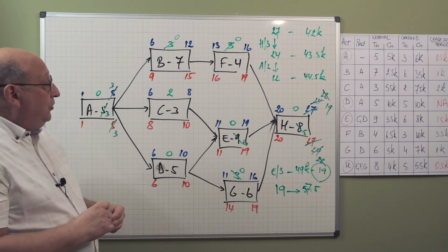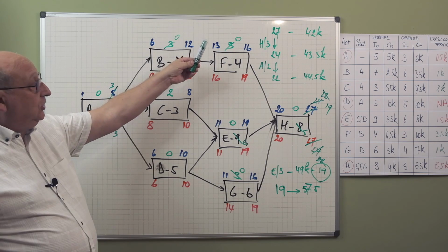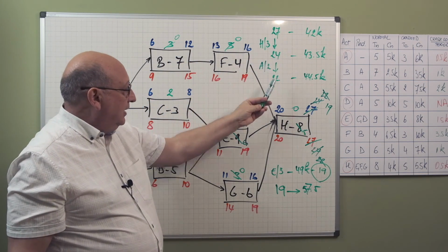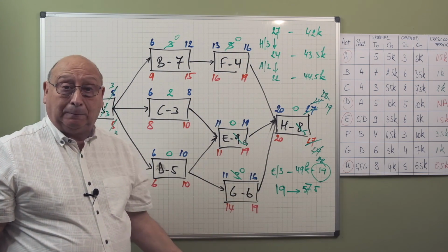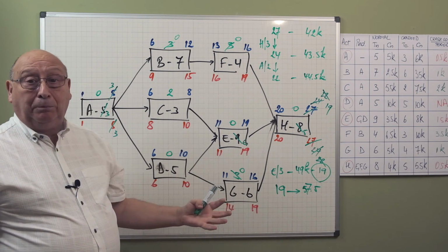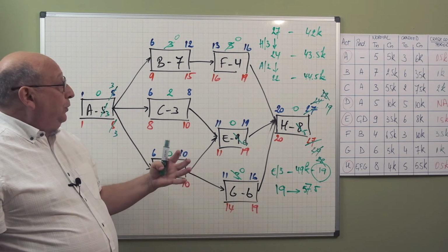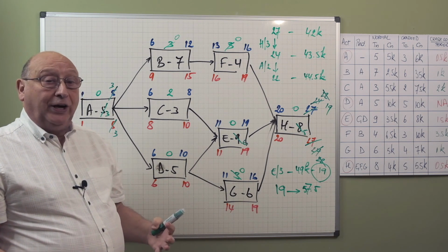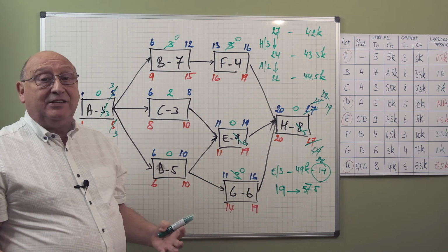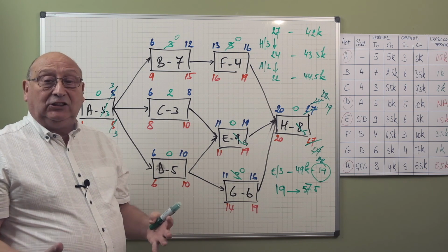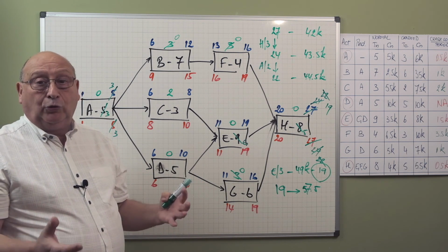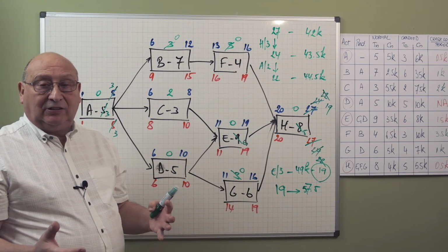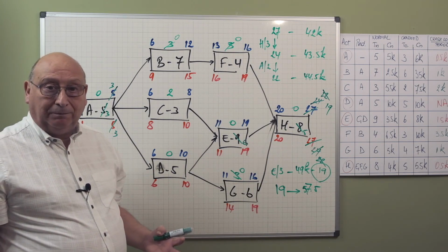Now, what we found here is the overview, the relationship between the duration and the cost of the project. And that we will put in a graph so that we can select whenever we have an agreement on a duration, that we can immediately find what is the cost for doing that project at that duration.